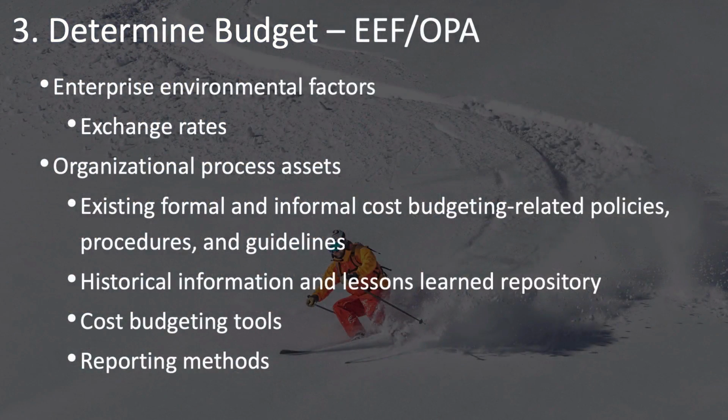Exchange rates and inflation rates can affect your costs. Although this has been done before when you estimated costs on individual activities and work packages, now that you're adding more costs at the budget level, these factors also can influence your project, as can the existing formal and even informal cost budgeting policies and procedures and guidelines and habits that your organization has, and your lessons learned repository's historical information about previous projects and how budgets were put together and what worked and what didn't.